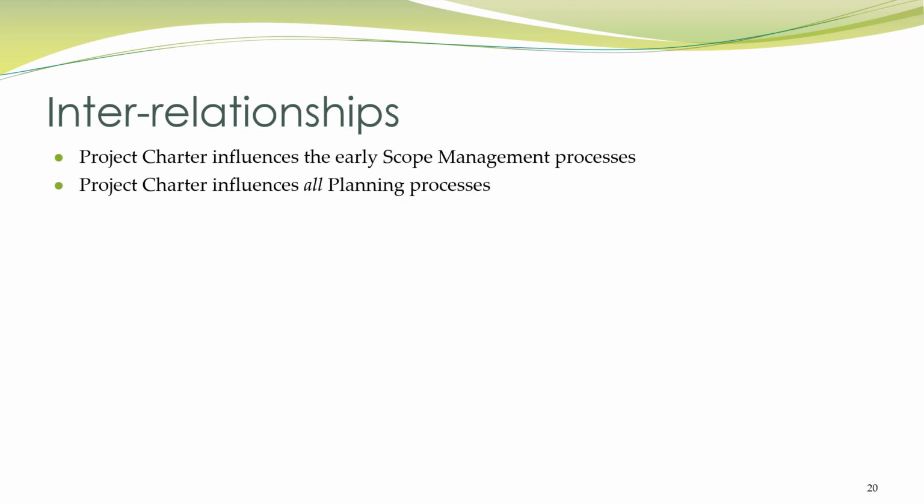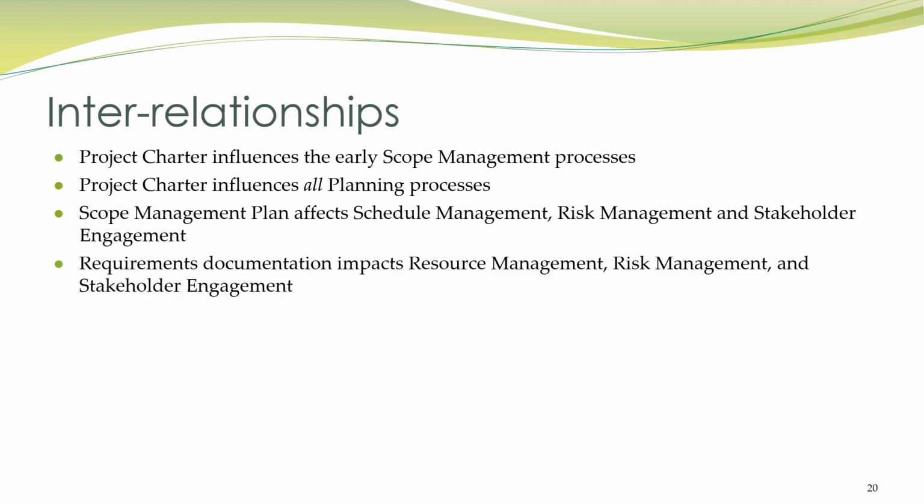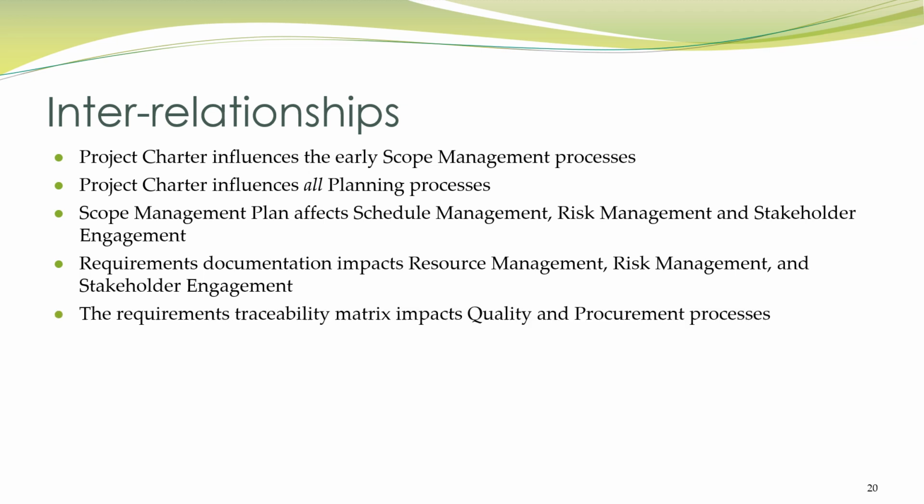Okay, let's sum up. The project charter influences the early scope management processes and all of the planning processes. The scope management plan affects schedule management, risk management, and stakeholder engagement. The requirements documentation impacts resource management, risk management, and stakeholder engagement.